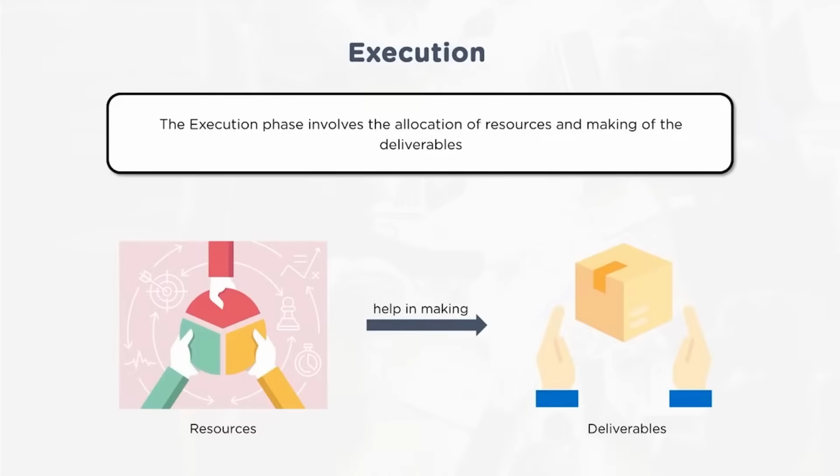Third is cost. As we know, to do any project, it is very essential to ensure the project happens within that budget. So project cost is estimated initially, then that estimated cost will be checked in terms of whether the assumptions and considerations are right or wrong, whether so much monetary resource is really required for the project. Then after understanding the justification and obtaining the clarity, monetary resources are allocated, confirmed, approved, and then it will become a budget. That will be a cost baseline.